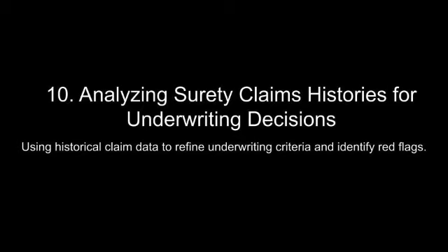Financial insolvency of the principal is a predominant cause, where mismanagement of funds, inadequate cash flow, or overextension on multiple projects leads to an inability to fulfill contractual duties. Studies, such as the one published in the Journal of Construction Engineering and Management, highlight that poor financial planning accounts for a significant proportion of contractor defaults.